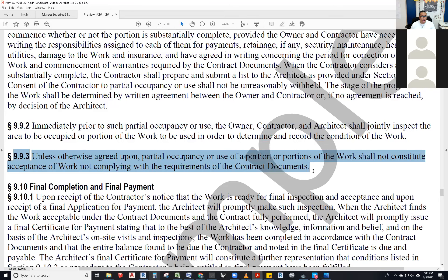Section 9.9.3 — and I want to emphasize this: our duty administering the contract for construction is huge. Doing those certificates for payment — progress payment certificates, substantial completion, final completion — those are huge. It really is us being the authority that makes sure everything is fair: people are paid for the work they did and not paid if they didn't do it. We're supposed to be unbiased — not just protecting the owner or the contractor, but protecting the project.